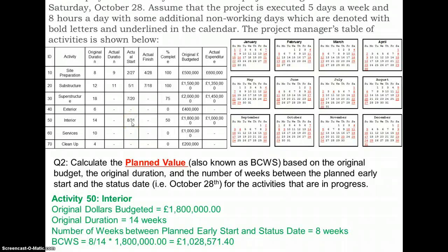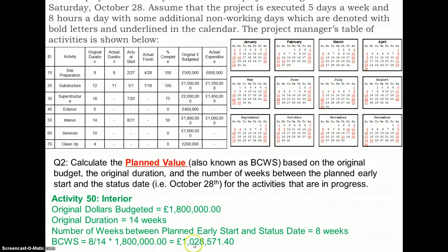A similar approach is taken to identify the planned value for the second activity in progress, which is interior works. The total budget for this job is £1.8 million and the original duration is 14 weeks. We are roughly at the eight-week mark, so we can just calculate the proportion — by the eight-week point we should have spent this proportional amount of money.